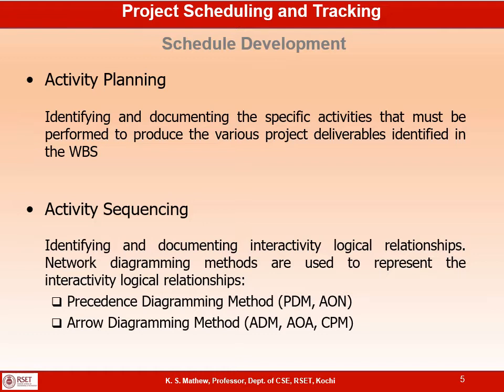For example, once you complete the preparation of SRS and review of SRS, there are a lot of activities to be done for preparing and reviewing the SRS. Once you complete all those activities, you can sign off the SRS. So sign off of SRS can be treated as a major milestone of your project. Similarly, design completion, coding completion, testing completion, release of the first version, all these can be treated as major milestones in a project. So once you complete activity planning, you get a list of activities and a list of milestones.